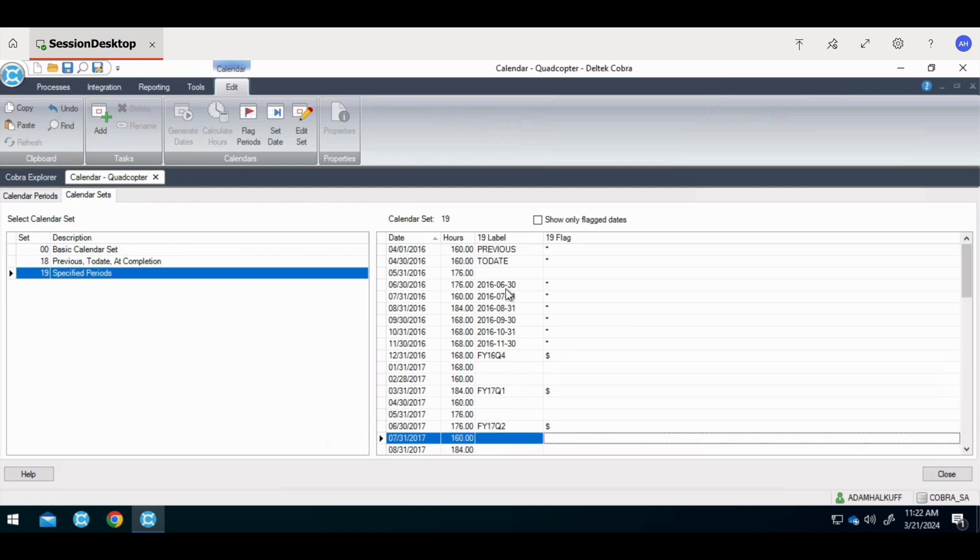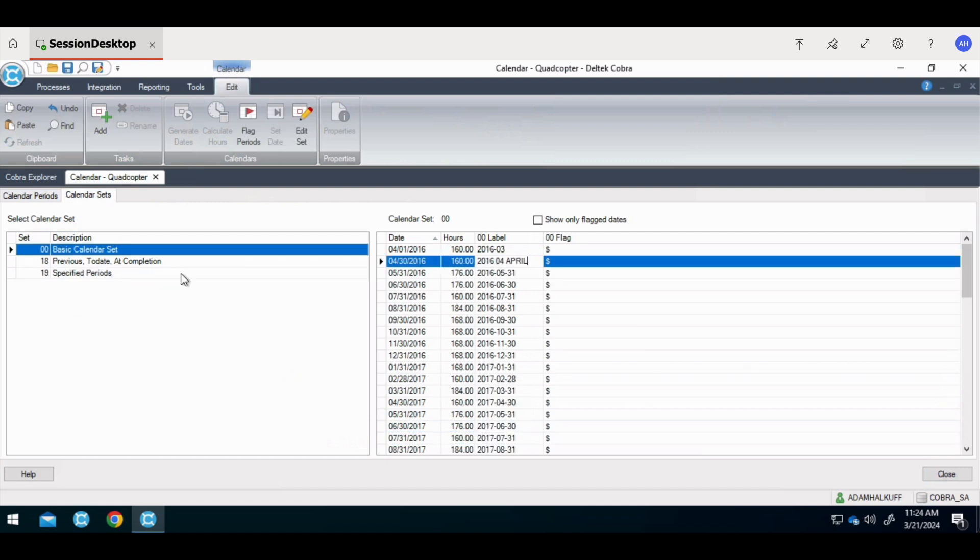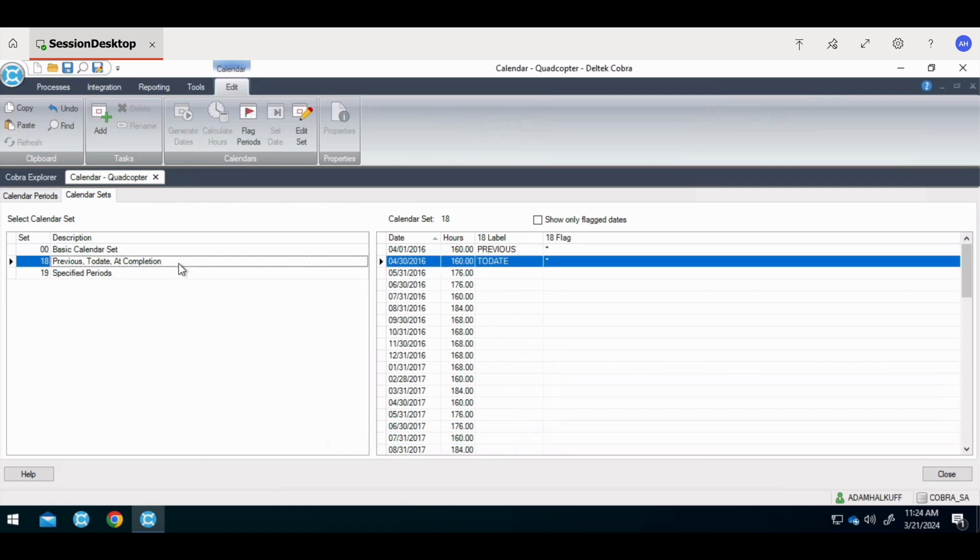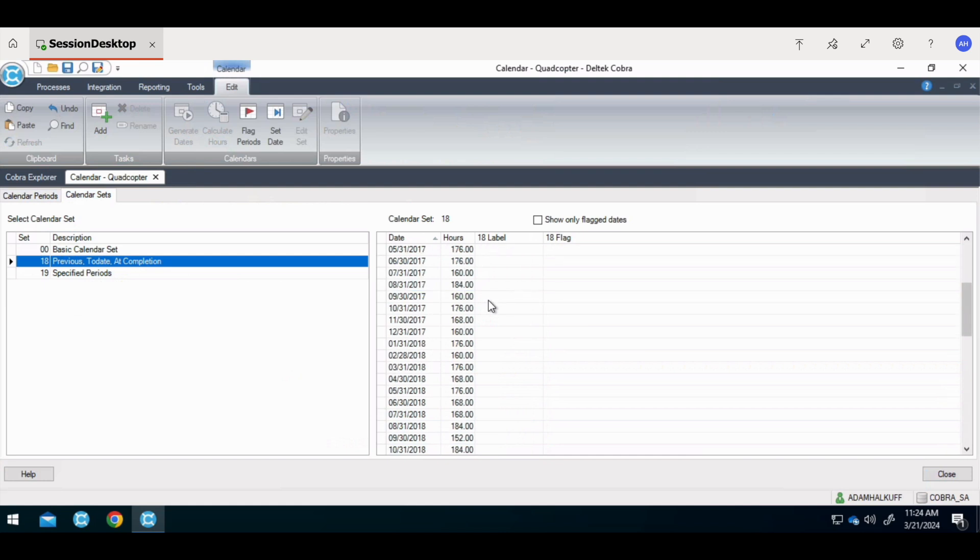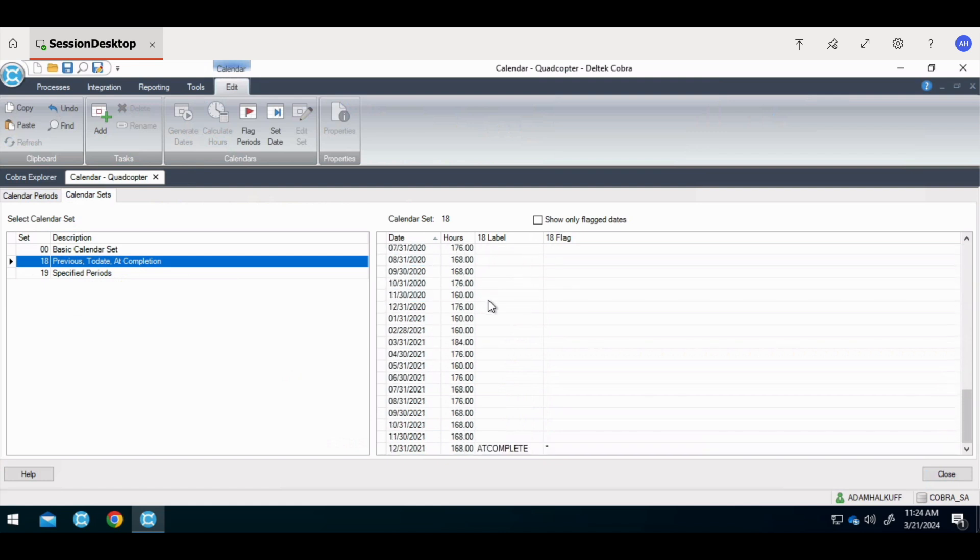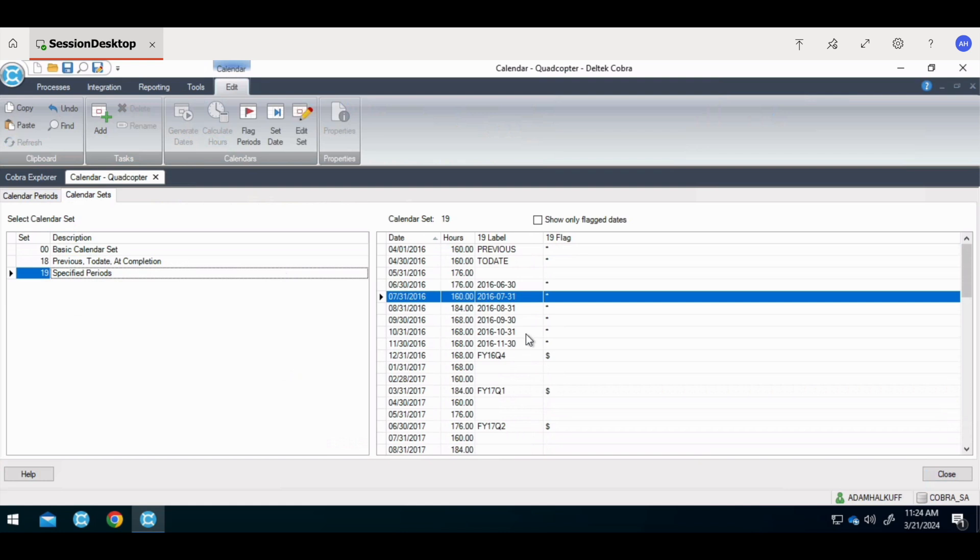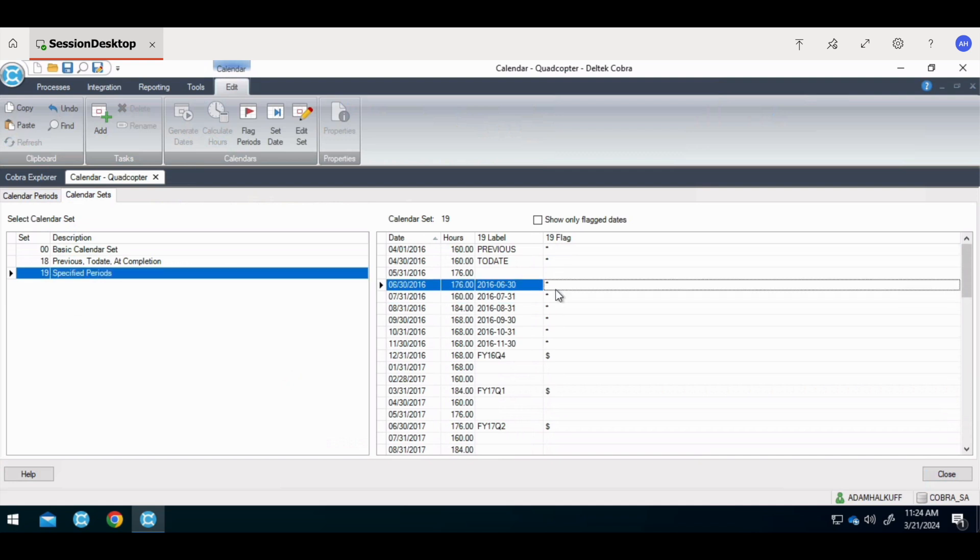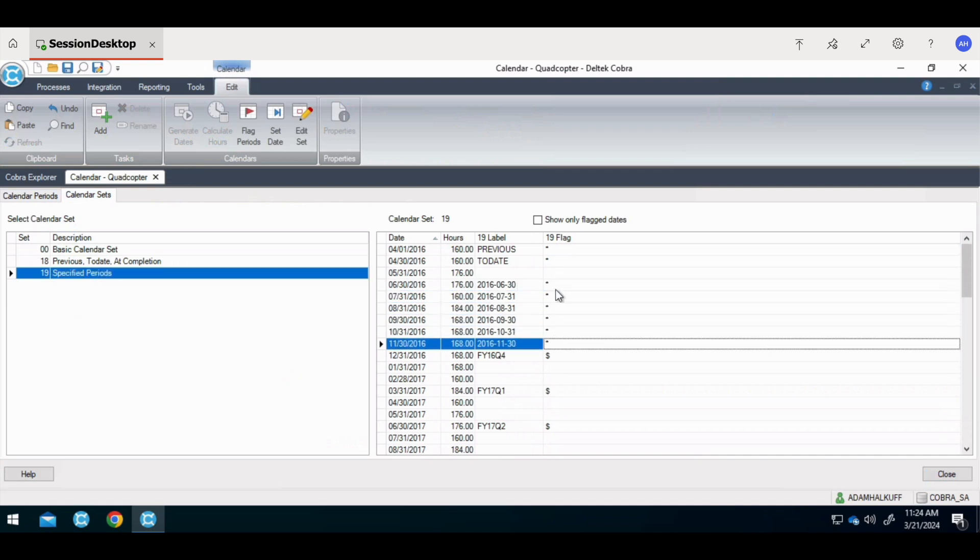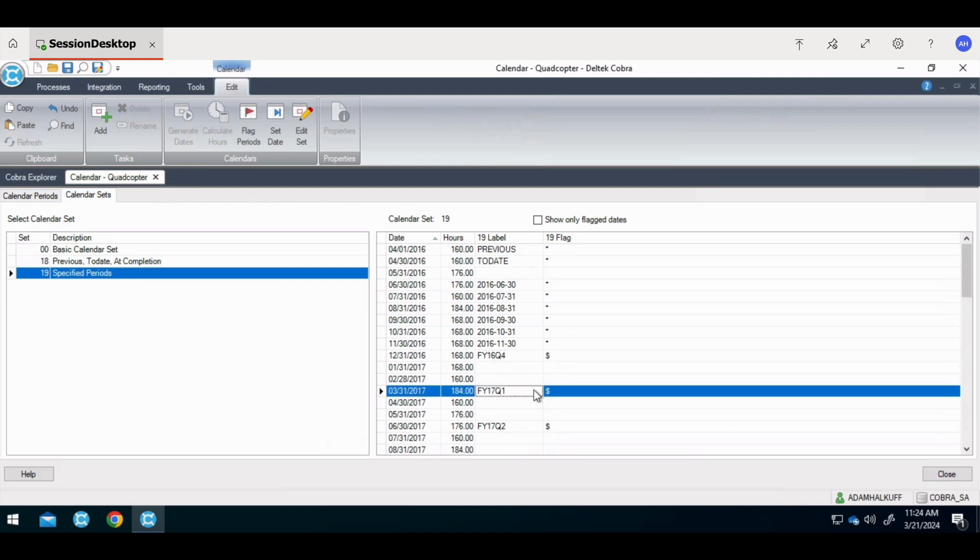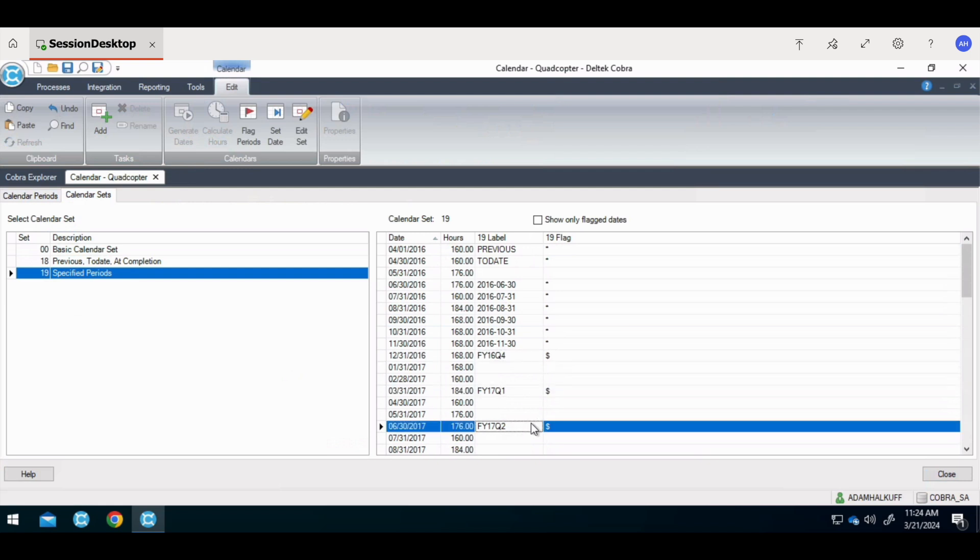The labels are used to define what style of dates or period labels appear on the columns or headers of reports. This text field can be changed to suit however the users like to see it. This data can be exported and imported to make mass changes. The previous and to date labels must be present on calendar set 18. They are used to define the current period and how Cobra sums up the cumulative information in formats 1, 2, and 5. The at complete label defines the completion date of the project and is used to sum up all of the prior periods for project totals.